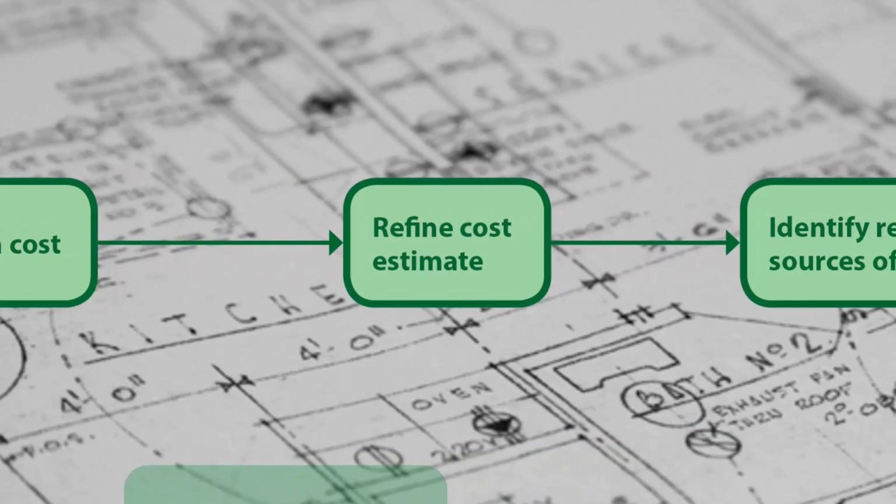As the design team provides greater specificity, rough cost estimates can be refined further by taking into account early projections of the size and type of buildings or special construction issues driven by site characteristics. In turn, this allows the development of an initial financing plan, where commonly available sources of financing are penciled into a project in an effort to determine its feasibility.